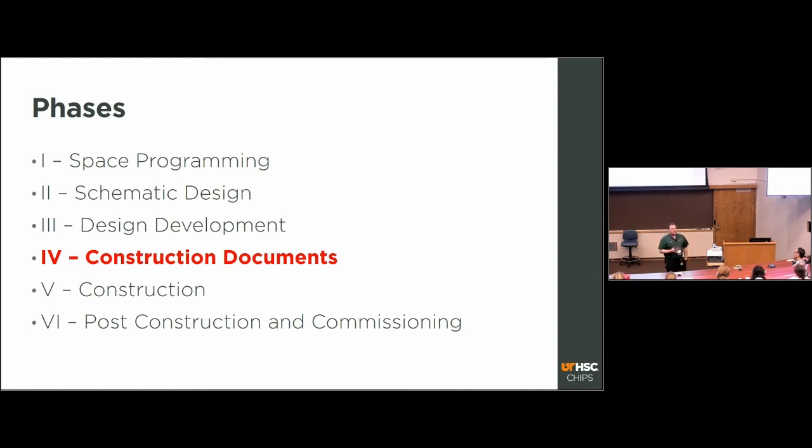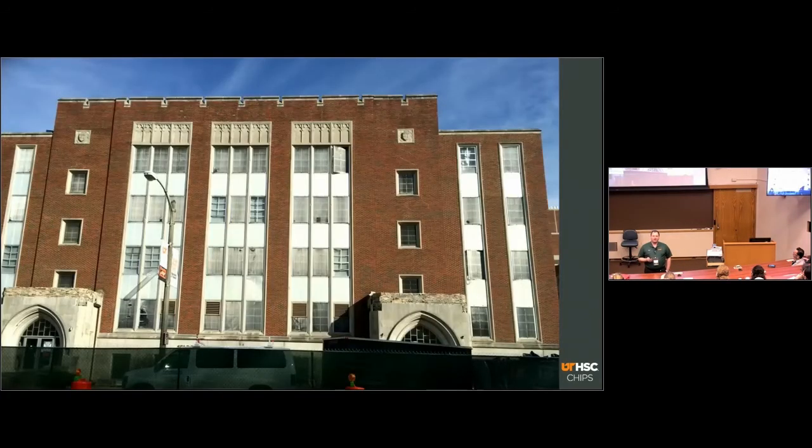Into phase four, where all the construction documents have to be completed and all the attention to detail. It's a super long phase of this, and it results in those big architectural sheets that you see printed. I think our book had 220 pages, and that then led us into the construction phase. To give you some timeline now, construction first required destruction of the prior building on the same space in the same lot. So this was the fort building, had not been in use for some time, is my understanding. It had to be torn down.